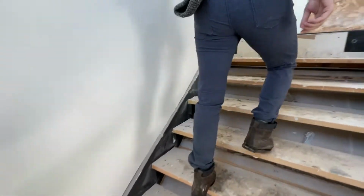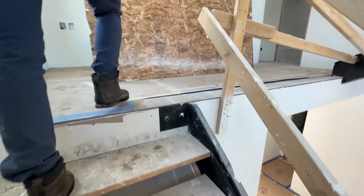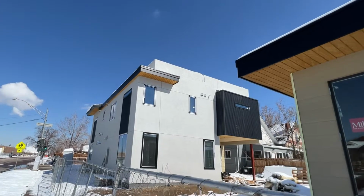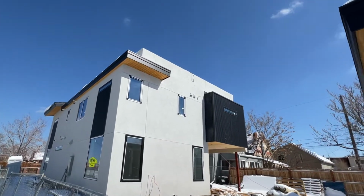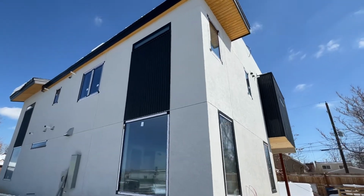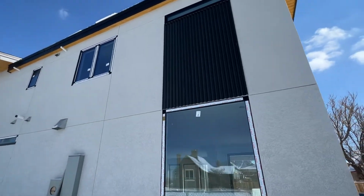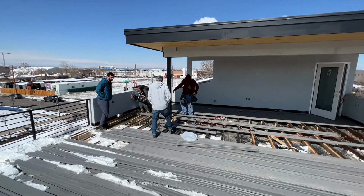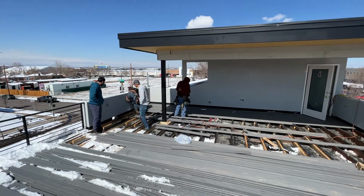Have you ever acted as a contractor or done any major construction before? Not any major construction this big. I've done small house projects before, but nothing to this scale. So what advice would you have for somebody who's thinking about being their own contractor with the Owner Builder program? I think it's a great process to save money. I just say come in prepared, be willing to put a good 10 to 20 hours a week, whether it be paperwork, making phone calls, coordinating with all your subcontractors and with HomeWrights to stay on track. And I think you have a good formula to build a great home at a great price.